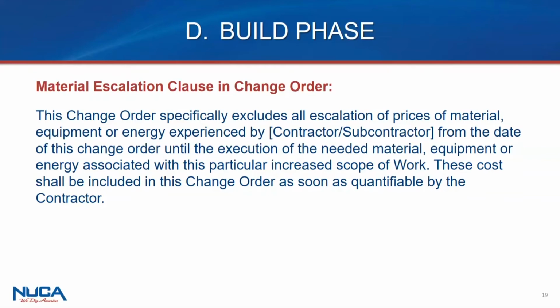Now, if you could actually change the terms of the contract in general, that would be great too. But at least we're mitigating risk when we say, okay, I've got some change orders. They're big change orders, and I can't cost it out. You don't want anyone to come back and say, you're not entitled to any more money because I gave you a change order and you had the opportunity to price it before I signed it.